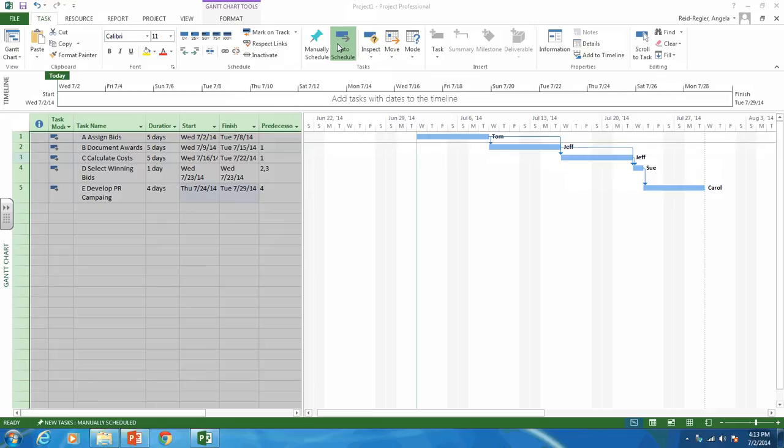you want to try and manually do it wherever possible. So for your deck project, wherever you have over allocations, any red, look to see if you could reassign the task. So maybe laborer one is over allocated, but laborer two is under allocated. So you could reassign the task. Or same with supervisor. Maybe they're over allocated and you could reassign the task to a laborer. So always look at doing things manually and figure everything out before having Microsoft Project level it for you.